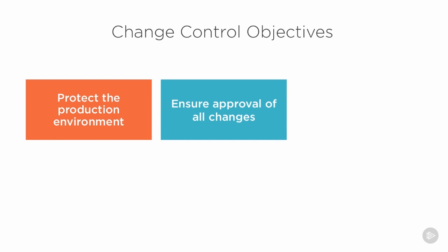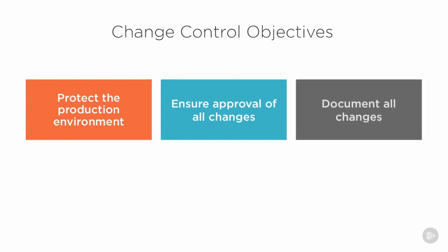And part of that approval should look at what impact this change will have on scope, on delivery, on budget, on security. In fact, every change should be reviewed for its impact on security. When is the best time to make this change? And of course, the best way to make the change.